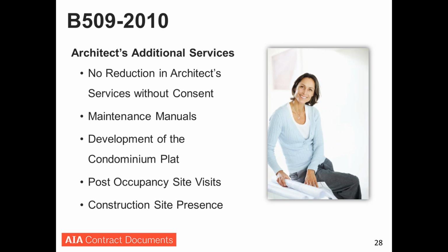And then additional visits post-occupancy, so you have an opportunity to see how the building is performing, and again, nip these things in the bud. I was involved as an expert witness in a case where there were like 25 separate buildings, all of which were developing mold due to moisture penetration. And the thing went on for years before it got to anybody's attention where they tried to fix it. And by that point, the damages and the remedies were much more costly than had you showed up and said, hey, I can see that water's getting behind that detail. We need to do something about that.